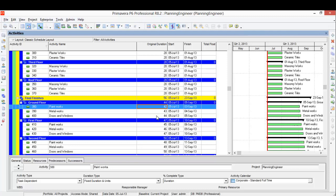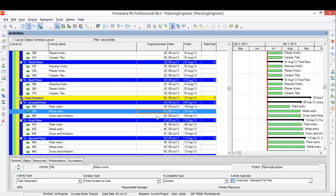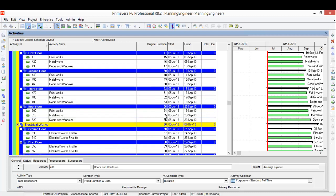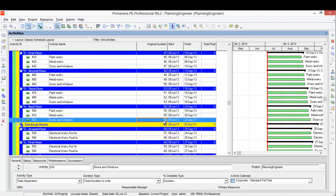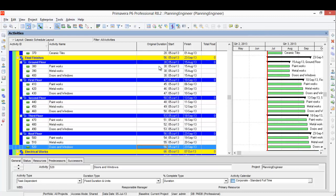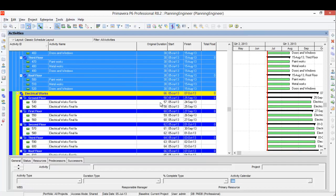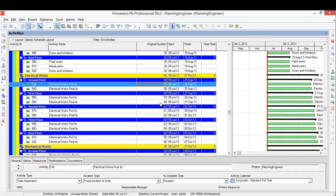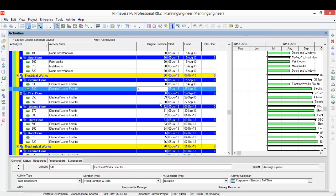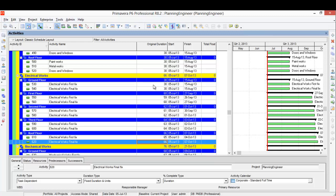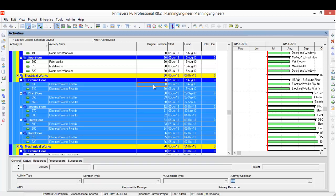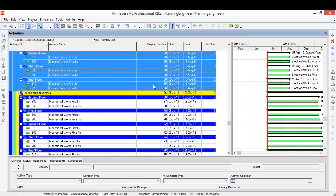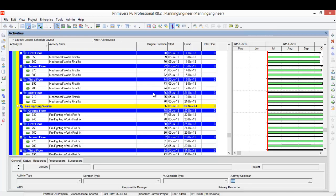Painting work, make it one month. Metal work, just to make it easy for us, I'll make all of them one month and fill down. Electrical work first fix and electrical work final fix, let's say 30 and 30, and I'll fill down with Control+E.